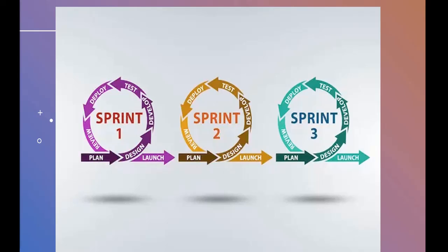And one sprint can be up to a maximum of 1 month. You cannot extend a sprint more than a month. So for example, if this is a 3-month project, each sprint can be maximum 1 month.